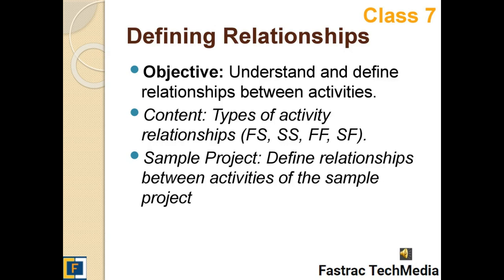Activities often depend on each other, which we represent through relationships. This slide explains how to define relationships such as finish to start, start to start, etc. We'll apply these to our residential house project, ensuring tasks are correctly linked. For example, framing can't start until the foundation is complete.